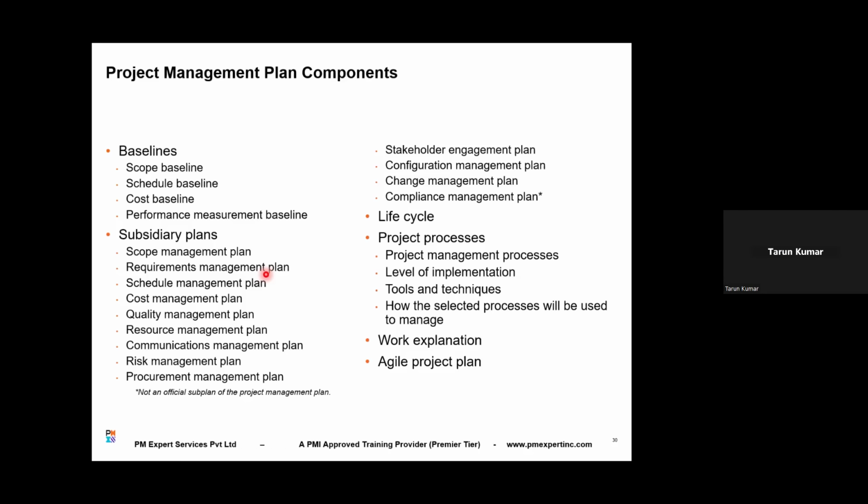So you can say that those requirements that will be delivered as a part of the project form the scope. You may have 100 requirements, but based on your budget or time constraint, you can deliver only 60 in a project. So those 60 requirements will be part of the project scope.